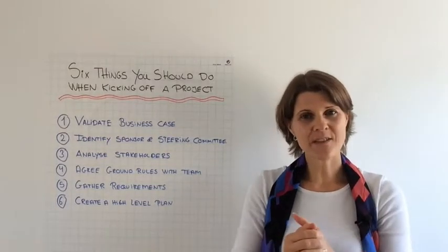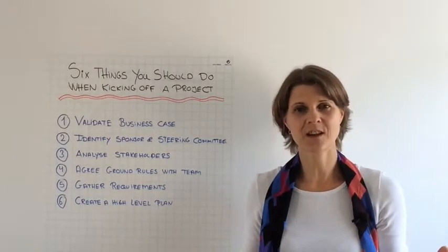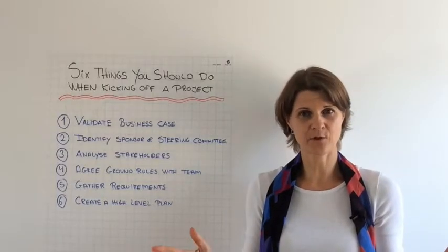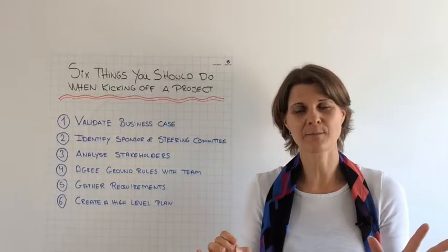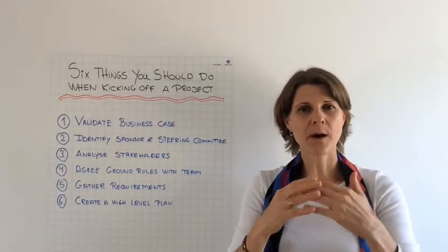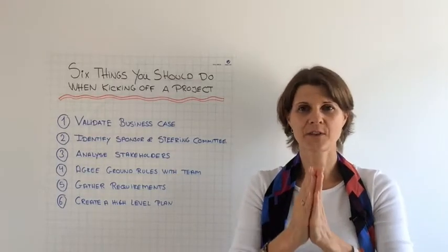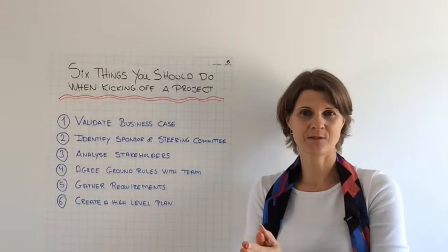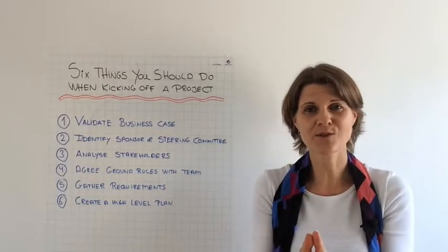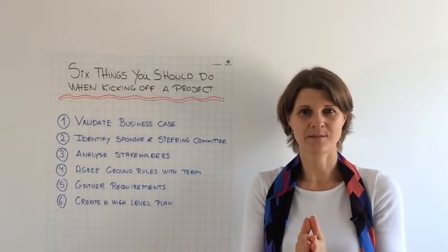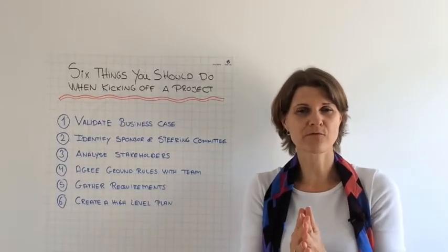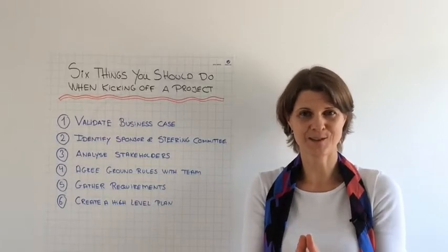So get the team together, brainstorm everything that needs to get done within the parameters that have been set for you, organize all these items, create dependency diagrams, and compile what you believe are the 10 to 12 major milestones. Assign responsible owners to each milestone and decide when they need to happen. You can also brainstorm the risks associated with these milestones.